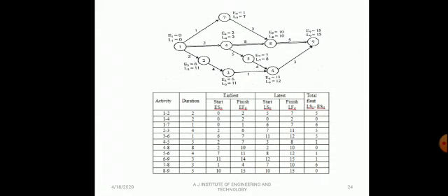Okay, let us start time. But 7 minus 1 is equal to 6. 2 minus 2 is equal to 0. But you have considered 0 only, not 6. This is the main procedure. From this, it is clear that, in summary, while calculating the earliest start time, whenever two activities are merging into each other, consider the maximum one. While for the calculation of latest finishing time, you take the minimum one when two activities are merging.